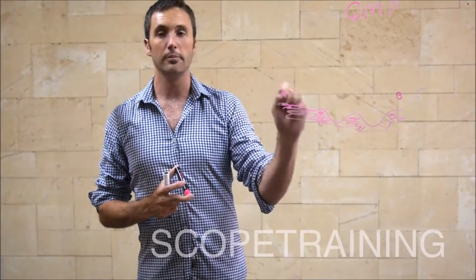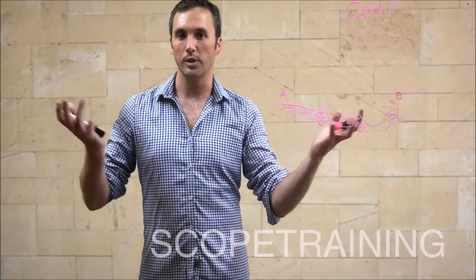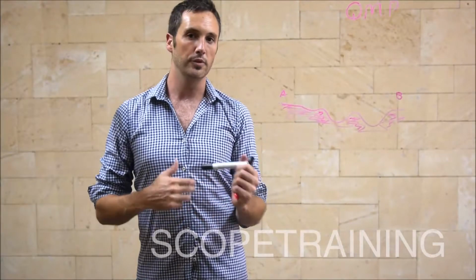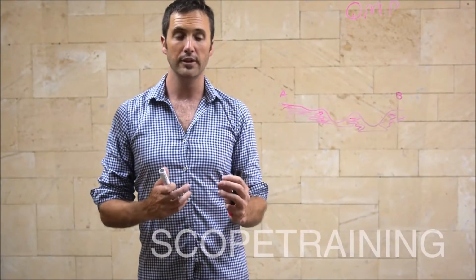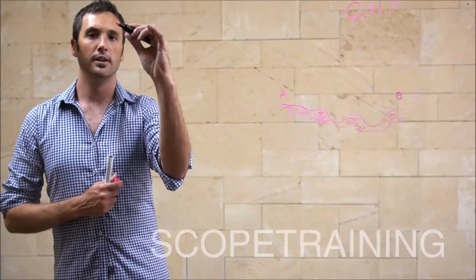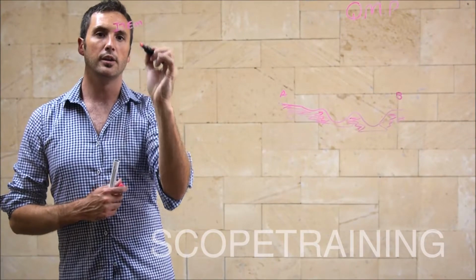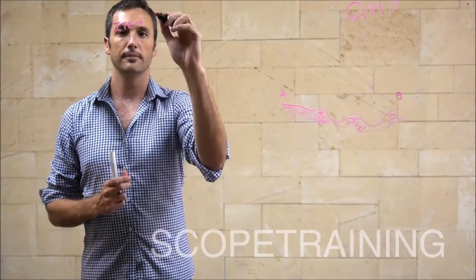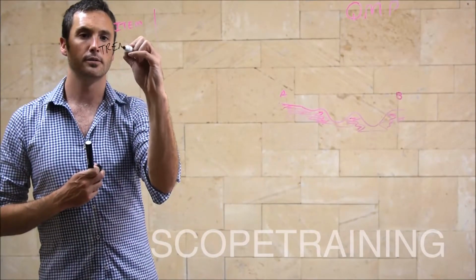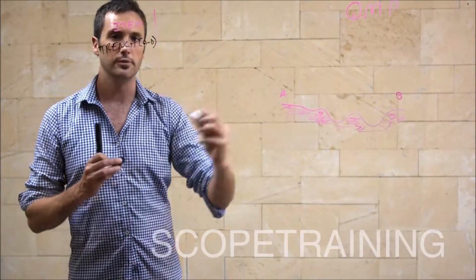So what we want to do is make this very objective. How do we make things objective? We use numbers, we quantify things, we say what we actually want to occur. And if you put some thought to it, you'll find that most things, even digging a trench, can be objective. So let's start. So the first thing I look at is a deliverable, which I'm going to say, what's the item that I'm focusing on? And the item here is going to be my trench, which we know goes from point A to point B, which has been marked.